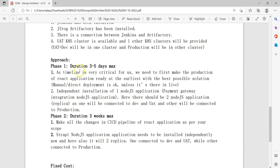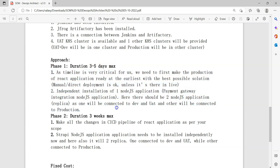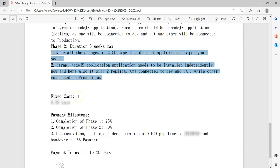In phase one, it will take three to five days and these are the tasks we need to complete. And in phase two, the duration could be around three weeks. These are the tasks we should deliver. And we have also mentioned the project cost, but usually project cost won't be mentioned in the SOW. But if it is a small project, yes, that's okay to mention it. Even payment methods also we have mentioned. This is how the SOW and SLA works.